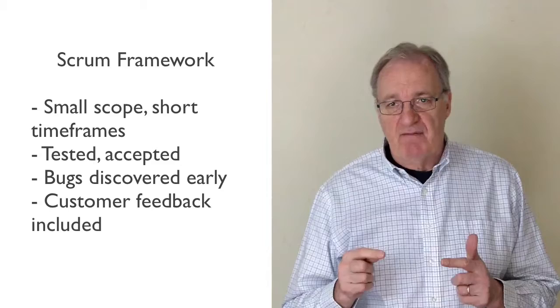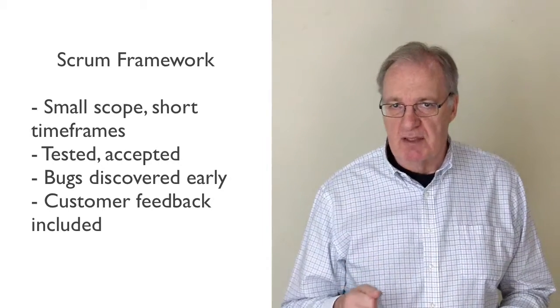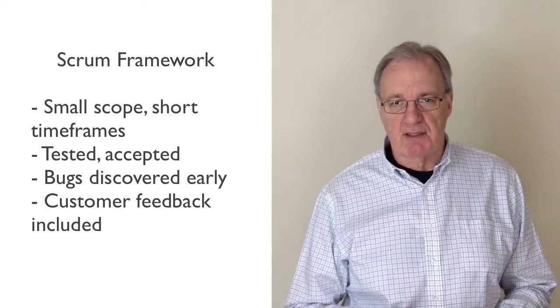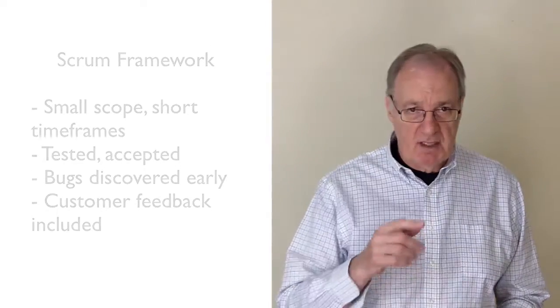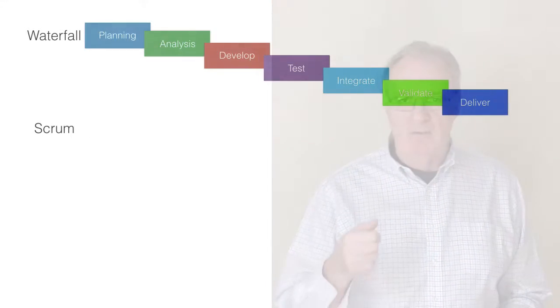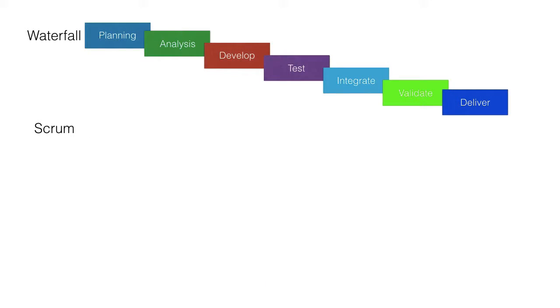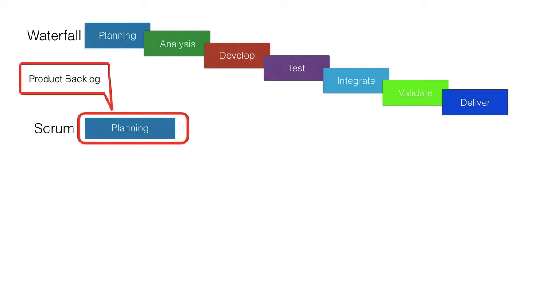And this same framework can also be used to develop many other products, not just software applications. In the Scrum way of doing things, the initial planning is done: developing the product backlog, release planning, and the first sprint backlog. Remember, the sprint backlog is a list of features and functions that can be developed within the fixed time box of the sprint.